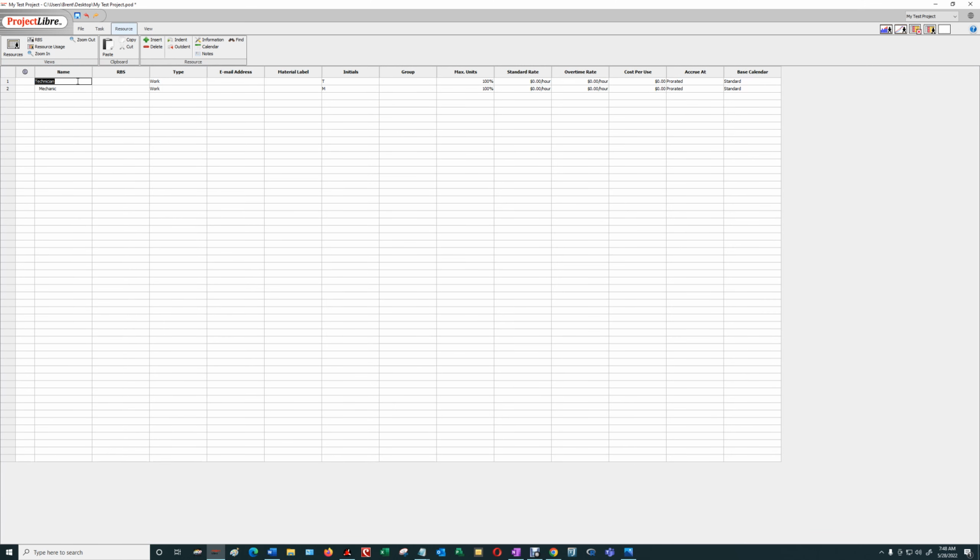And here I've typed in some resources. I typed in technician, who is work, not material. The max units refers to the number of the technicians I have, and 100% is one mechanic, 200% would be two technicians, 150% would be one full-time technician and one half-time technician.